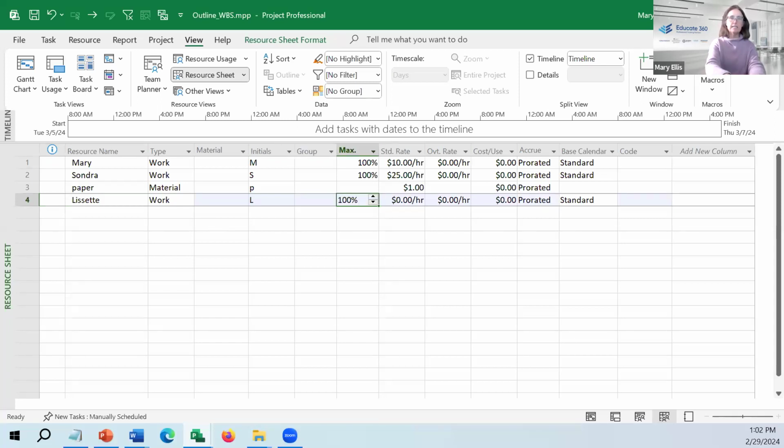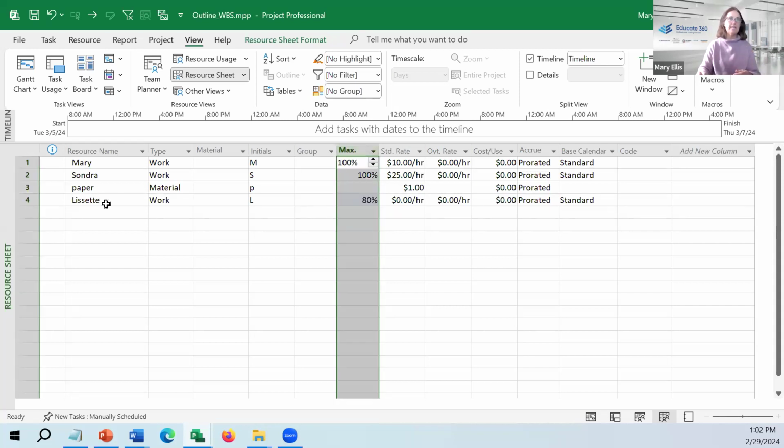And they determined it's like 67% between meetings, breaks, lunch, phone calls. You might just say, I'm going to say 2 hours of your work day, you're not going to be working on my project. And the other 6 hours, you're dedicated to my project. So I put your max unit at 80.